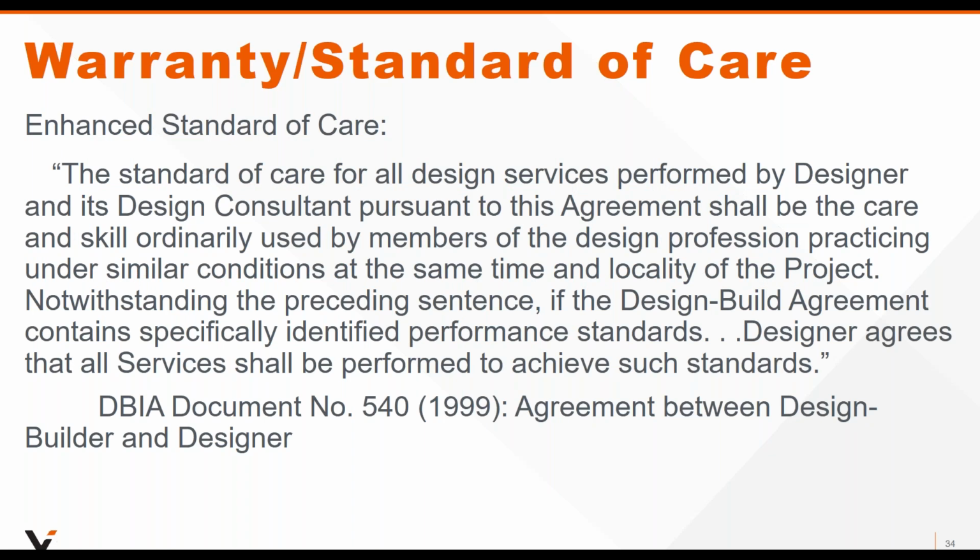Although it's from 1999, this language, we still see it when we're reviewing contracts, and it's from the DBIA 540. It states the typical standard of care at the beginning, but then it says that if the design build agreement contains specifically identified performance standards, then you will agree that all services shall be performed to achieve such standards. This obviously opens you up to a much greater standard that is present in the design builder agreement.